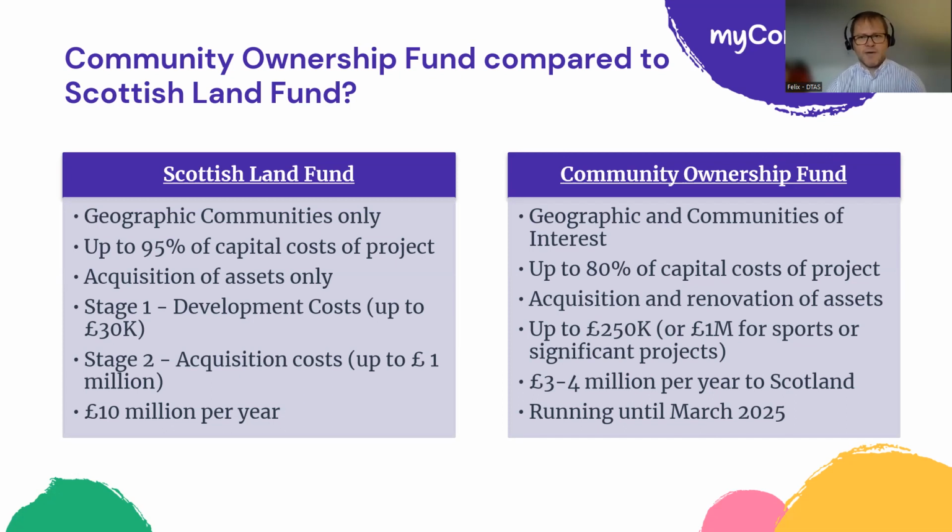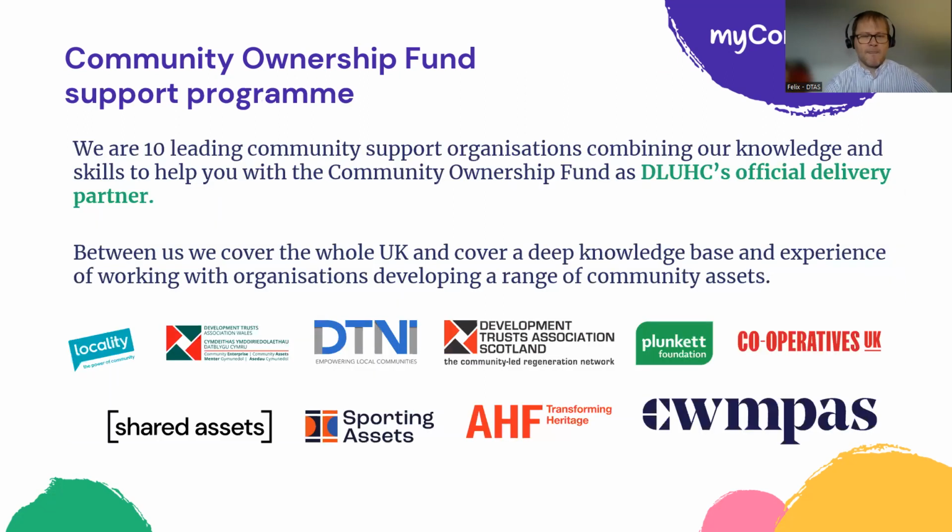SLF can be used for match for the Community Ownership Fund, but you need to be really careful of your timings. And we'll talk more about that in a little bit as well. Really important thing, which I'm going to mention later, but I'm going to mention now as well, the Community Ownership Fund match spending can't be spent until your application is approved. So don't spend any of your match until your Community Ownership Fund application is approved.